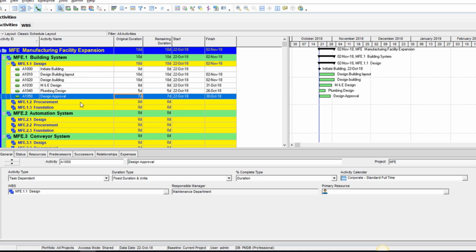And because we've not entered any other activity, our phase is showing that it's a 10-day project, and the project is also showing a 10-day project. The reason is because we have not created dependencies. As you can see from here, all the activities are starting on the same day and running concurrently, and that's why you're having this duration this way.